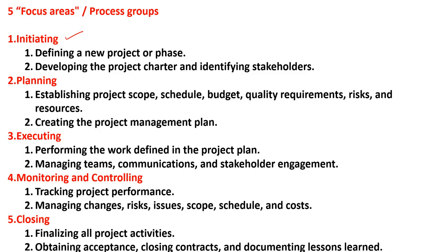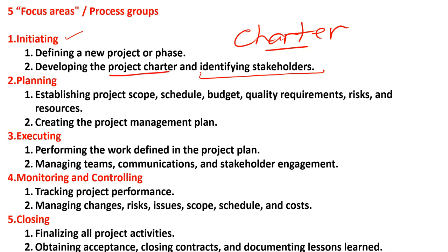Whenever you start any project, the first thing to keep in mind is that you have to make the charter, and the sponsor will approve your charter because he will provide you the funding. Developing the project charter comes first. When the charter is approved, the second process is identifying the stakeholders. So in the initiating group, keep in mind there are only two processes: one is the charter, and the second is, when the charter is approved, we have to identify the stakeholders.